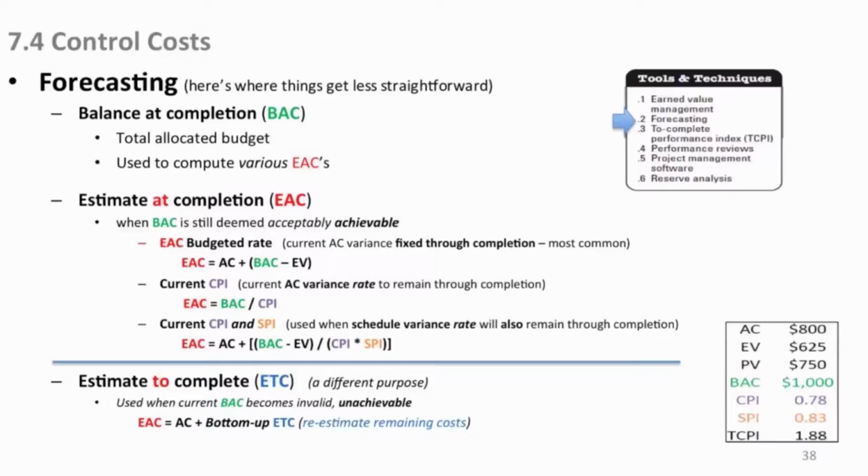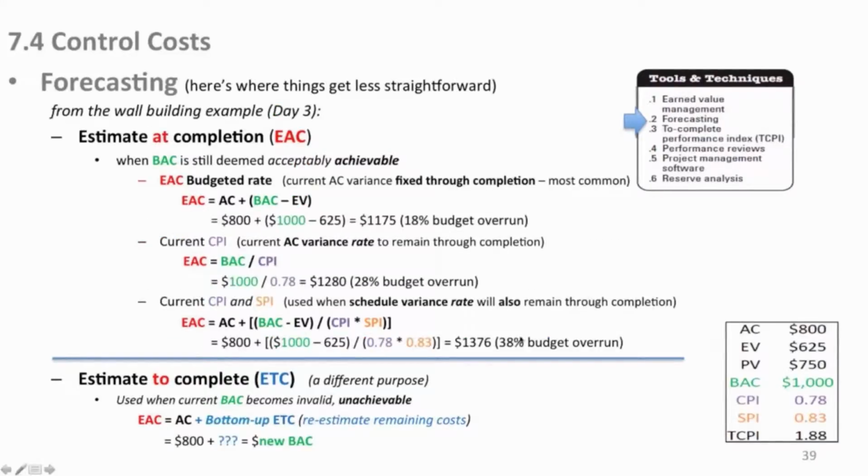They won't always be like this necessarily. They may give you the EAC at the end. They may give you this number over here, where is it, $1,376. This is your budget overrun, and your CPI is this, you've spent this much, and your earned value is this. What is the SPI? You may need to calculate that. So you need to know these formulas backwards and forwards. They're the same formula, but you need to know a little bit of basic algebra to move these things around.